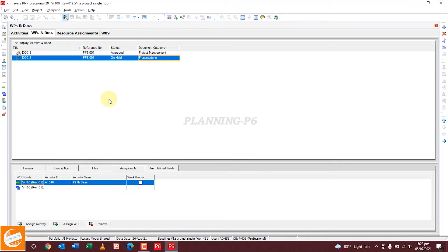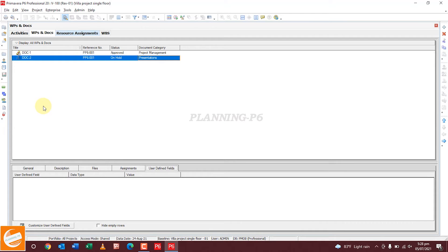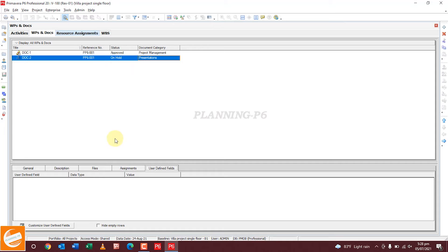Now, how can you see these documents assigned to your project? Click here to see which documents are assigned — all documents are listed. You can also print or export this as a file. You can use this as a document delivery schedule for the project, and you can track the documents very easily.